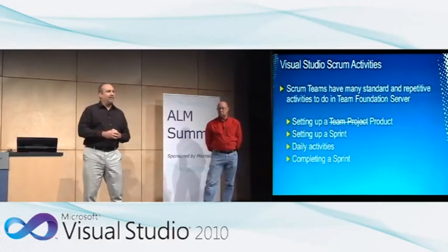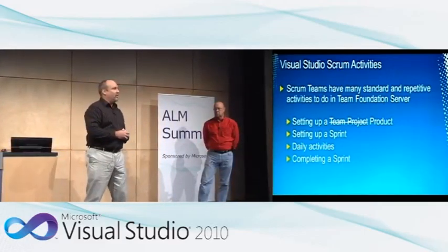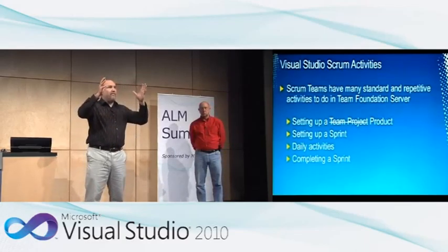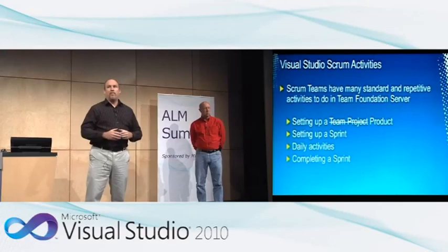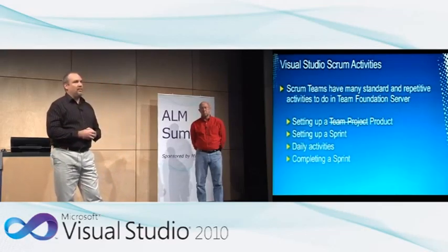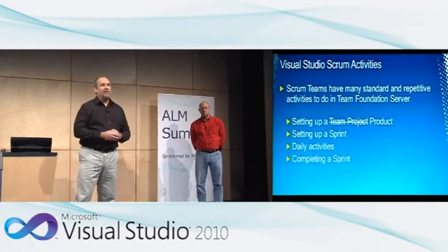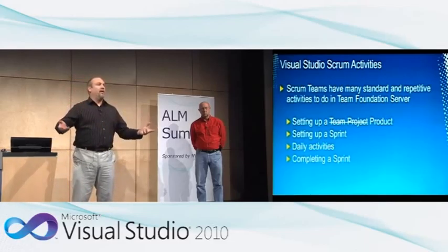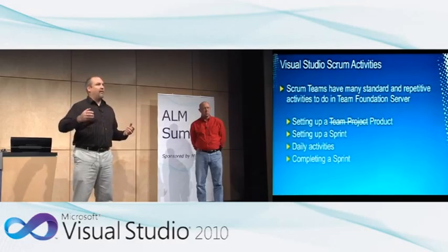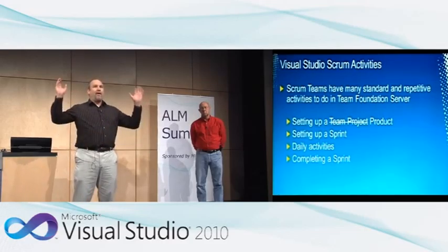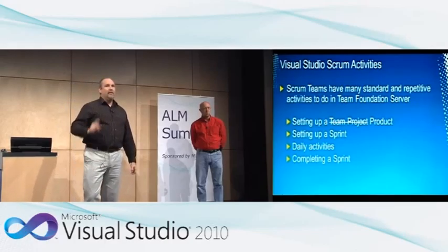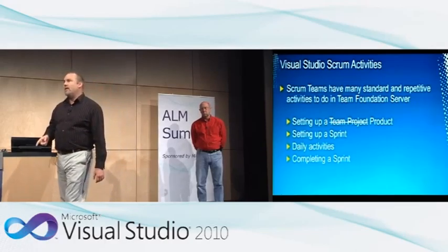So as far as daily activities go, in creating the Professional Scrum Developer course, I just kind of thought, well, this is what I've thought, and bounced it off a whole bunch of other smart people that do this as well. And we've come up with kind of a list of things a good Scrum team should be doing using TFS each day. And it's the no-brainer things. Update your work remaining on your task work items. Change the states. Update the sprint backlog by putting in new tasks. I'm out of work. Go to the tasks that are not assigned to anybody and pull in one, not just that you want to do, but one that needs to be done.